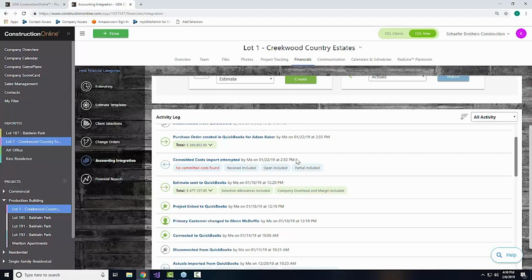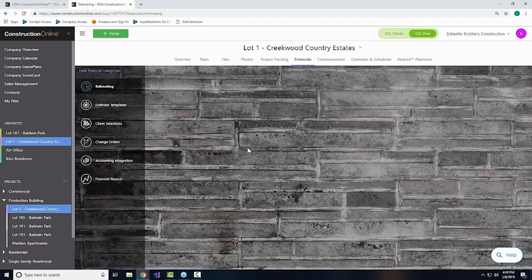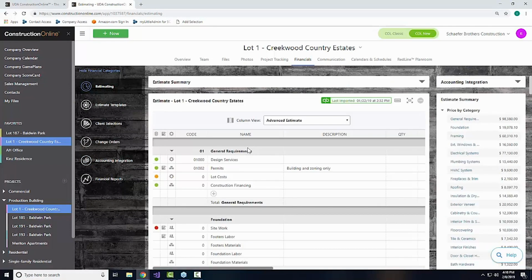And of course, once the job is finished and we step back into the estimate to do our project recap, to make sure that we're identifying potential pitfalls on future projects and shoring up the areas in the estimate that need a little bit of additional attention. Maybe we're still using pricing from 5 or 6 years ago when lumber prices were a little lower, or I worked with one company who, when they were first getting started with us, were using steel prices from 1980, and they were building mostly steel structures. So that's a potential problem that we could then refine in this case.